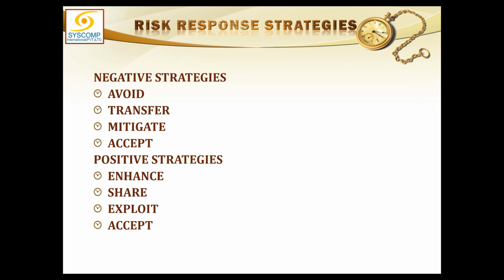Let me give you an example of share. In transference, what I did was, I tried to outsource a portion of my project to someone who can guarantee that he will deliver that in that specific time. And if he doesn't, then he will be penalized for that. So essentially, that contractor is taking the load. He is taking the brunt of the risk.